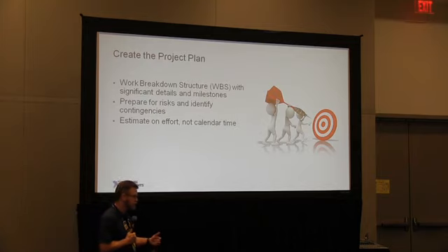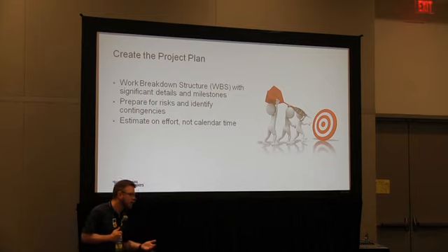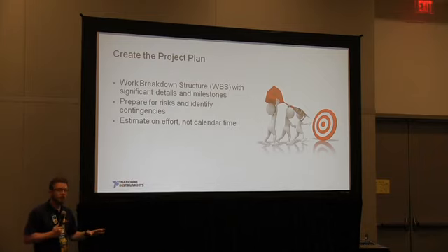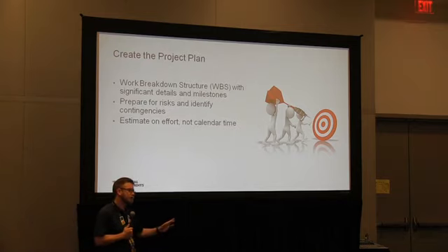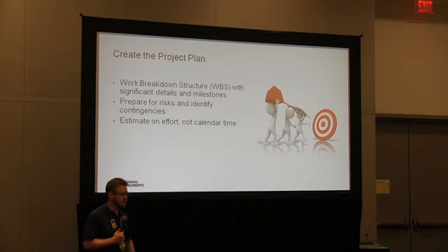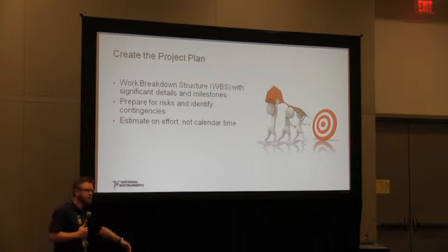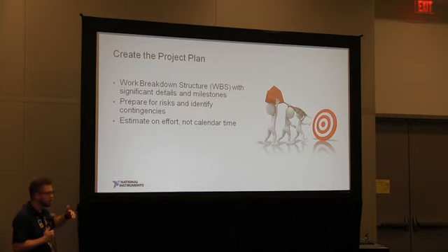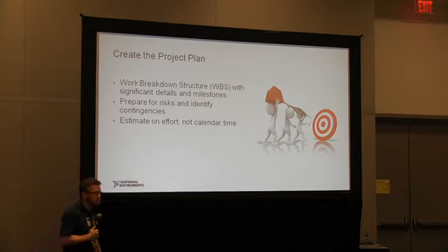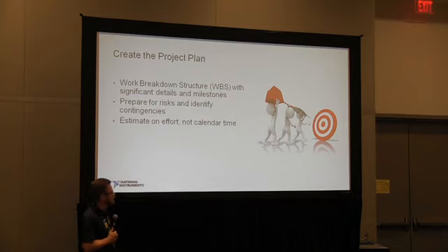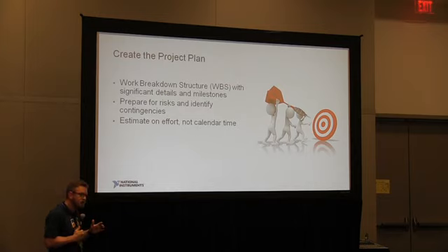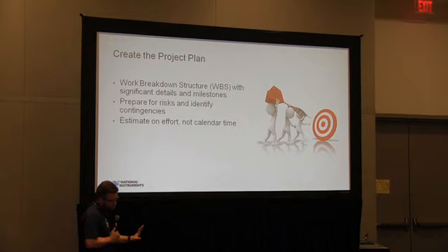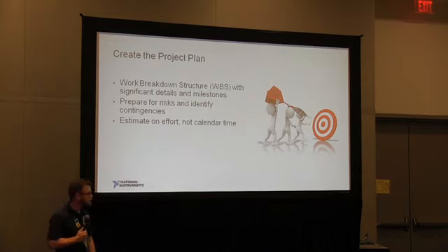I'll just throw this in there too. Keep in mind that hours worth of work changes a little bit depending on the year. You could have holidays, you could have vacations and things like that, so you might remember that, especially on a long project. If you say, oh, we'll have that done by September 15th, did you take into account that there might be summer vacations? Your developers may be out, there could be holidays. So once you figure out what that effort is, the number of hours may not equal the calendar end date.